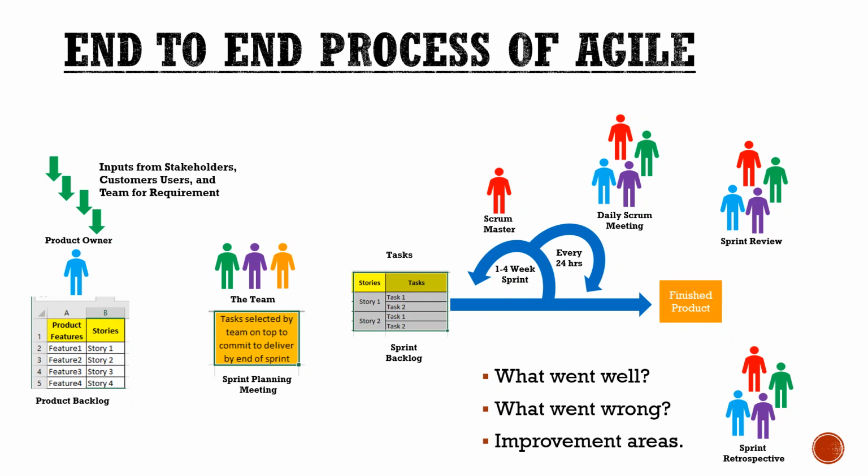Sprint means a set of activities, showing how fast we are going to complete the development of the software. Usually a sprint will take, for example, 2 weeks in certain companies, and in certain companies around 4 weeks, exactly a month. So we take these stories into a sprint. A sprint is the duration of completing the user stories assigned to it. It is the duration we take to complete the stories.